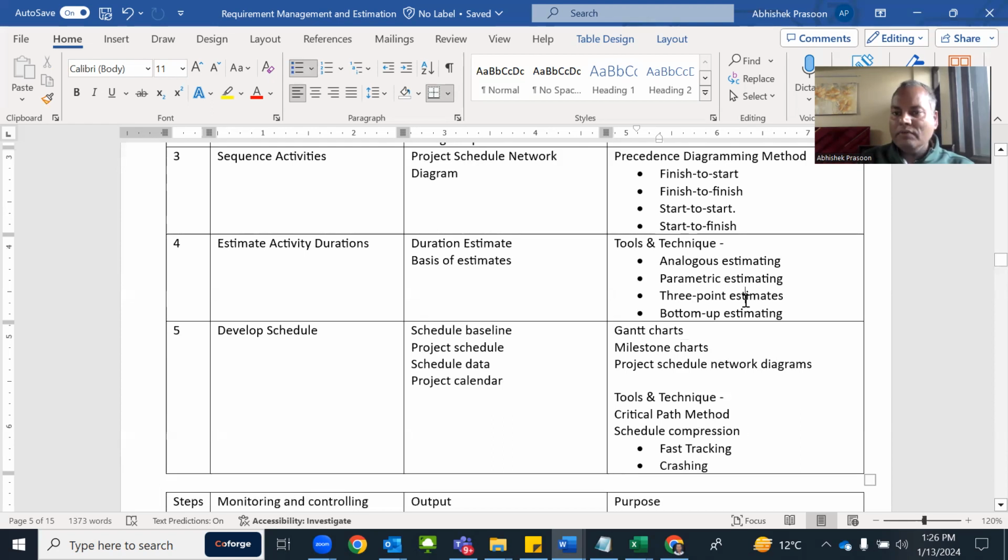Then in that case, maybe you got the idea from the internet or from your colleague or from some other people, like, okay, usually one table takes 1 day of time for development, and you have to develop 10 tables. So you simply multiply 10 into 1. You require 10 days of time for table development. I'm just trying to estimate that table development activity.